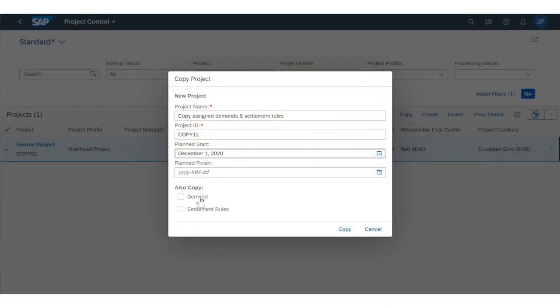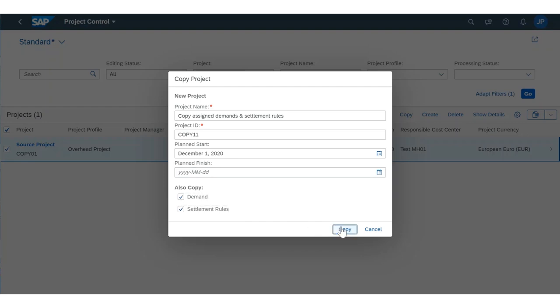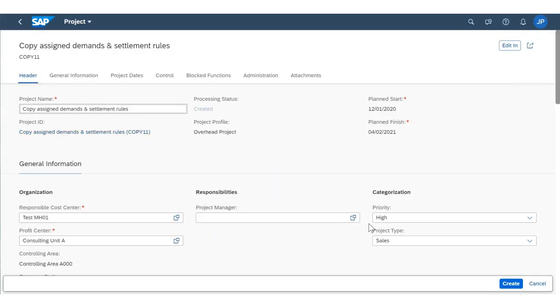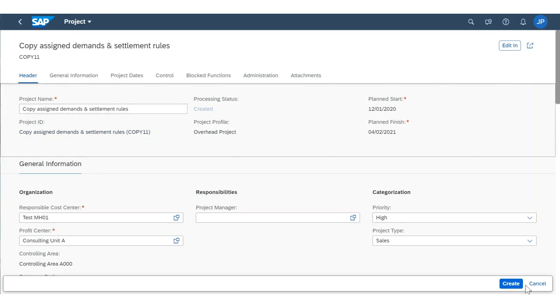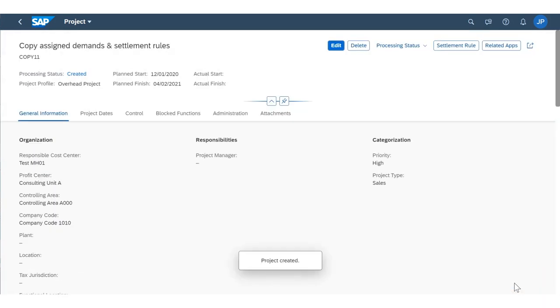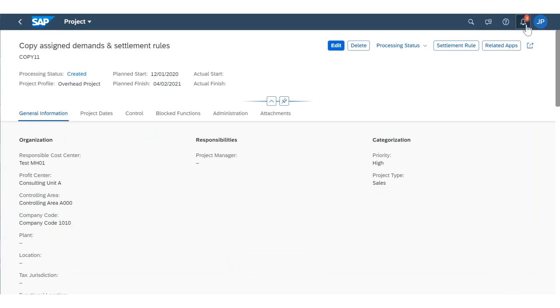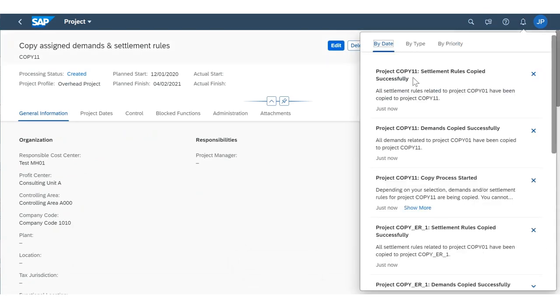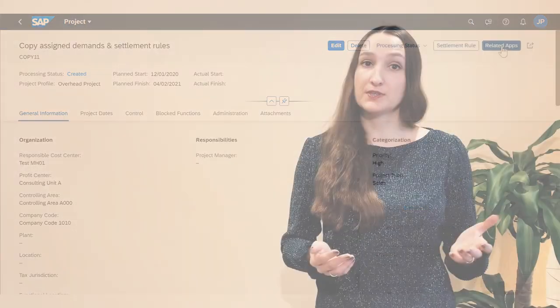Regarding the second enhancement in this area: when copying a project via project control, you can now decide whether or not you would like to copy the assigned demands and settlement rules. This can save a lot of manual work. Notifications will inform project financial controllers once the copy process has started and once it has finished.